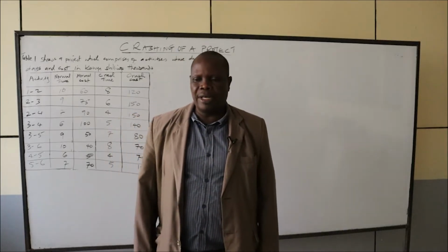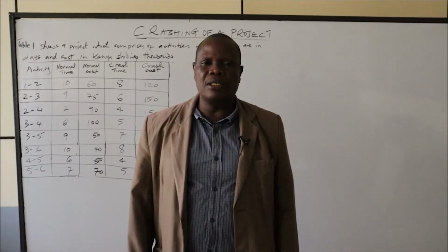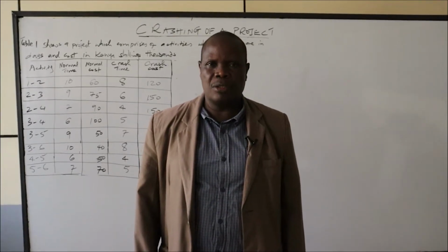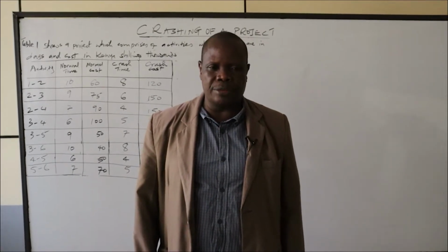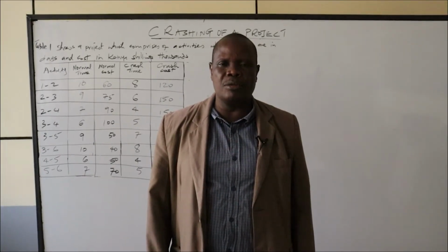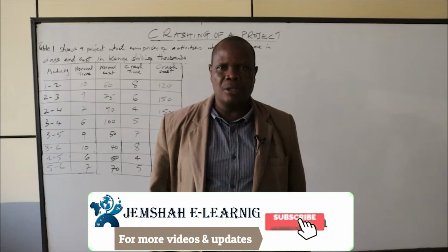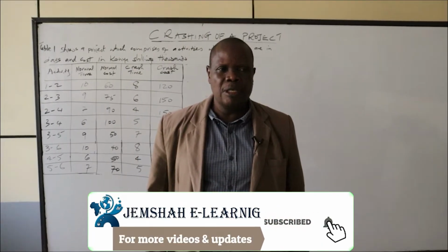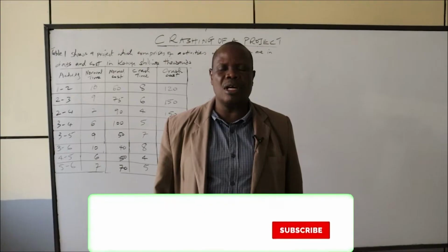Crashing of a project is a deliberate reduction in the planned duration of the project by using extra resources. When you use extra resources, you shorten the activity duration, which eventually reduces the planned duration of the project. Now, in crashing of a project, we have some terminologies which we'll be using, and eventually we will apply those concepts to crash a project.